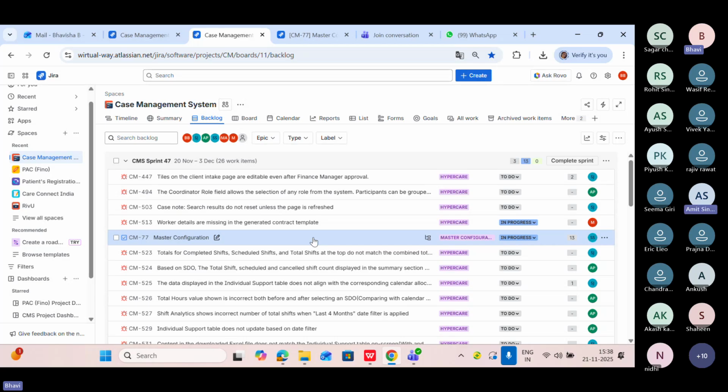And if you're joining any company, they may ask this. Question: can we create this new sprint without completing this existing sprint, or we cannot? No, we can't do it. We need to complete the particular sprint first. One more thing, as you can see, 3rd December is the main date on which our sprint is ending, so you need to create your next sprint on 4th December.